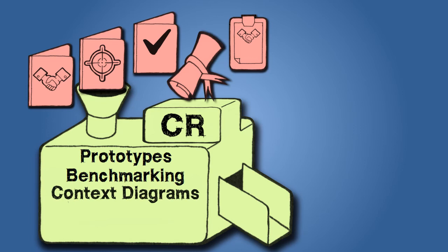A context diagram is a visual description of the project scope. It's kind of like a network diagram, but instead of showing a logical progression of tasks, it shows how people interact with a business system or equipment, like a computer network or bulldozers in a quarry. Document analysis is when the project manager analyzes all the paperwork that's generated and uses that information that's relevant to the requirements.